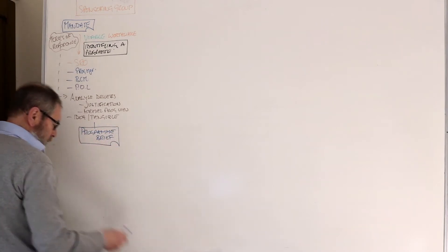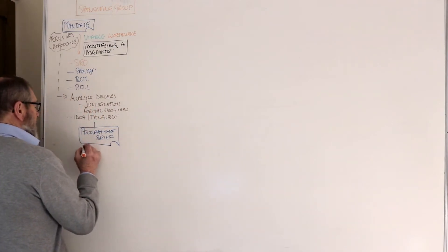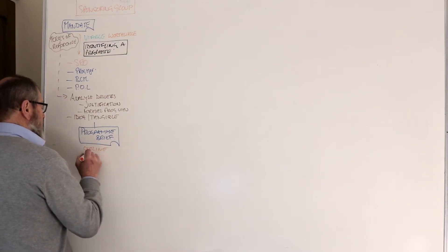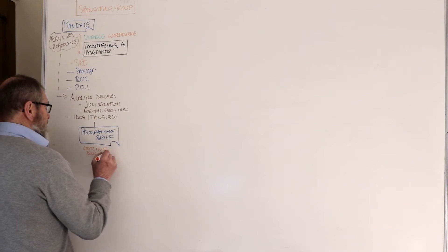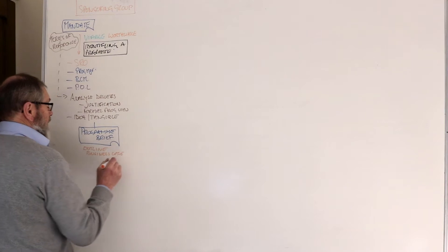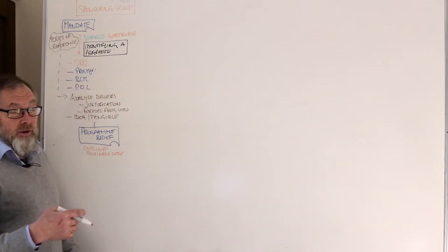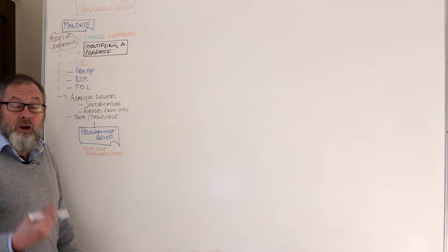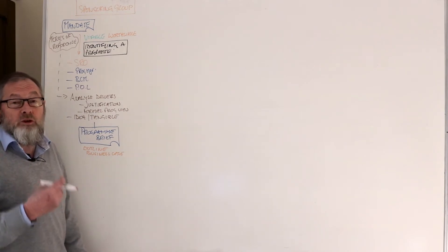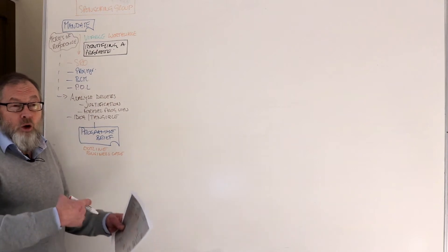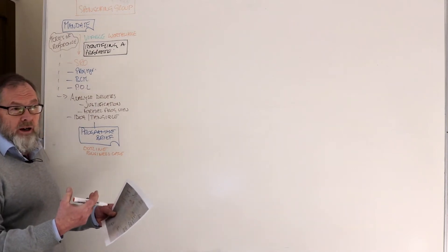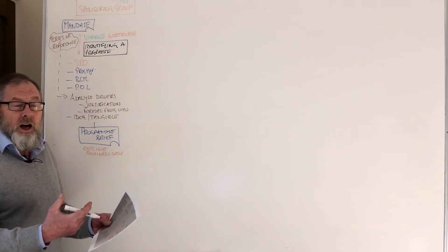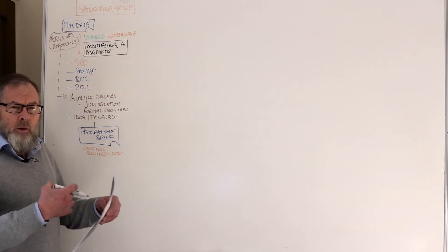The program brief is also arguably the outline business case. From MSP's perspective, it treats the two documents slightly differently, but if you bolt them together, the business case looks primarily at timeframes, budgets, why we're here, the rationale, the vision, the benefits, the investment, major risks, and the options we may have on how we want to roll this out — options being linked to how much we've got to spend and the type of transformational change we want.